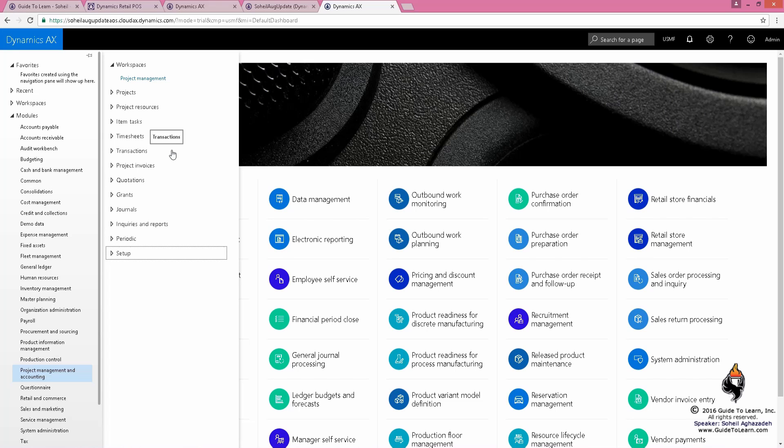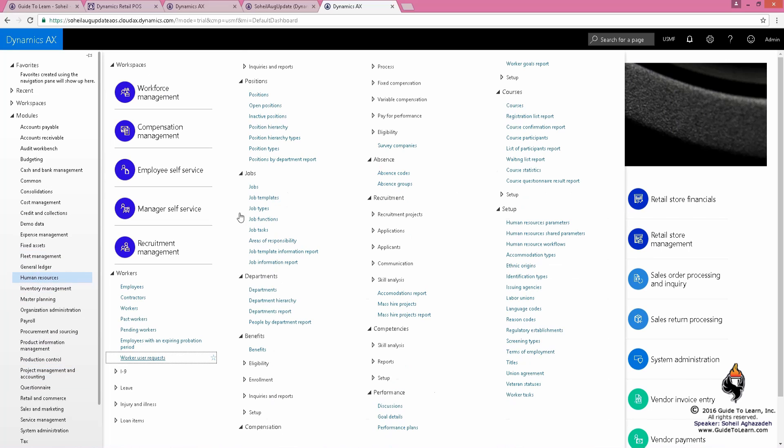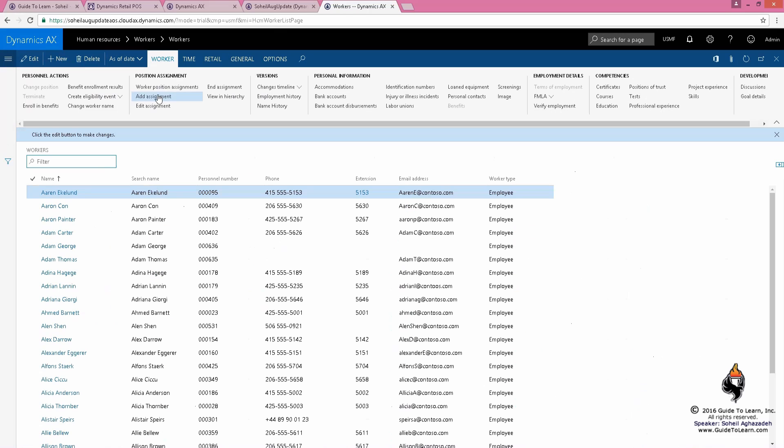The beauty of the Project Management and Accounting module in Dynamics AX is that I could, as a project manager, say this project requires these resources. I don't care about individual, I care about talents. I need to have a developer, I need to have somebody who is certified, I need to have somebody who is familiar with Azure. And then HR module has all of those information about the workers with the competency level, the skills, certification, experience, etc.